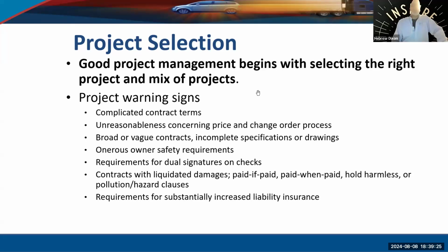Requirements for sustainability, increased liability insurance, a substantial increase. Sometimes if you don't know that up front, you couldn't have priced that. If they tell you at the end of the day, then know there's a change order coming. You don't want to start off with a change order mentality, but if you see some of these things that you didn't catch, it's better to be honest with them now that you didn't catch them, right? And yeah, you may have to eat some of that cost. You have to make that decision. What's the best thing to do, but make it from a numbers perspective, not emotional. That's the key, and that was the whole lesson learned: how do you manage it without emotion, right?